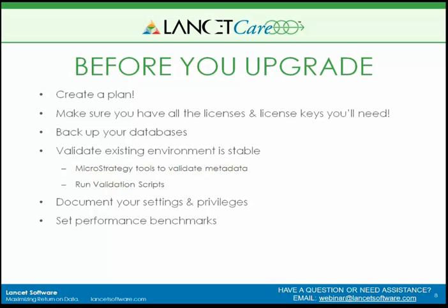Okay, so we have our project plan in place, but we're not quite ready to upgrade yet. What we always recommend, and whenever we go to client sites to perform upgrades, we always have a pre-upgrade checklist, things that should be in place before your project team starts working on the upgrade. Especially if you have an outside consultant coming on, the last thing you want is a person coming on site the first day and you need to chase down license keys or access.